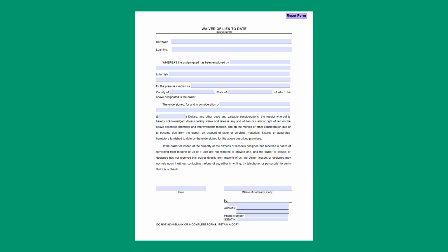Lien waivers need to be submitted along with the notarized sworn statement at each subsequent draw request after the first draw is processed. It is common for a lien waiver to accompany a check or cash payment to your subcontractors at the same time the payment is made, lessening the chance that this important step is not completed.